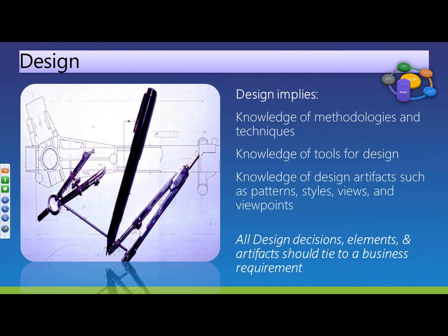So here I am, an architect, I designed a solution, I'm working with the stakeholders, right? And all of a sudden, we're into implementation 6 months, and one of the stakeholders comes back and says, well, I need this capability that doesn't exist. And I need it for a show we're going to show at in 4 weeks. And the wrong answer is absolutely, be happy to accommodate that. The right answer is, great. Let's look at the trade-offs of what that's going to cost us, because obviously something's going to have to give if we put that in.